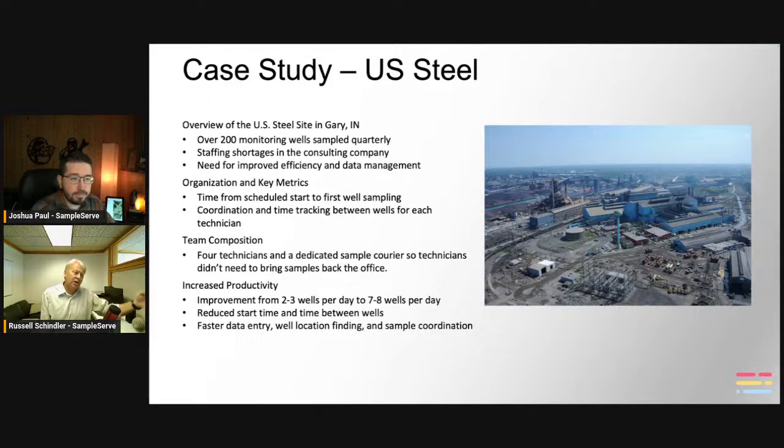It shouldn't take that long to move your equipment over. In a lot of cases, people are taking an hour and a half. It's because when they're using paper methods, they have to go through their files and check what they're sampling on that well, look up how deep it is so they know they have the right amount of tubing and what the anticipated depth to water is.